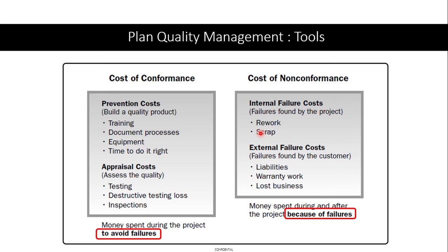It depends on what the SLAs are. Sometimes yes, it can be an input to you. If your SLA says that whatever system you deliver should have 99.9 uptime, then of course in turn it is a quality parameter for you, right? So your software development guys, when you are talking about the architecture, should start developing that. And maybe you have parallel processors, maybe multi-threading, or high availability, load balancing.